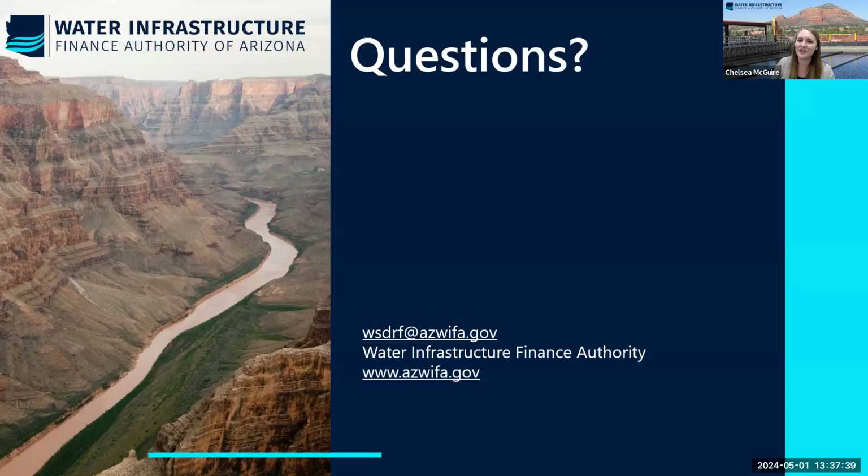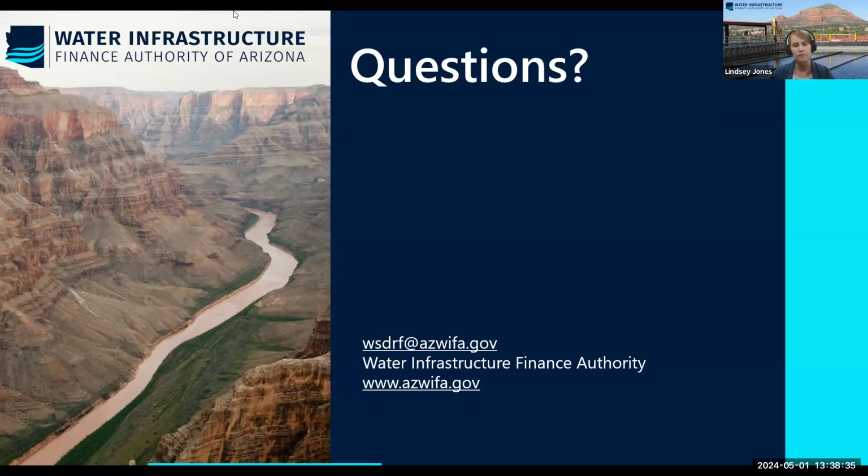Perfect. Ernest Behringer asks, if a grant and or loan is granted, what's the relationship between the grantee, the AMA, and WIFA in terms of the scope, the management, schedule, fund usage, all of that kind of thing? I'm not totally understanding the linkage to the AMA part of it, but certainly you'd be working with WIFA staff to confirm as you're going through the project that the project is happening. We'll have the project managers working with you to make sure we're staying on scope and on schedule. It's a reimbursement basis or cost incurred. So similar to the SRF program, you'll incur costs for your project and submit disbursement requests to us that we will review and approve. But as far as there being any sort of linkage to the AMA or reporting requirements or ADWR, that doesn't really apply for this.